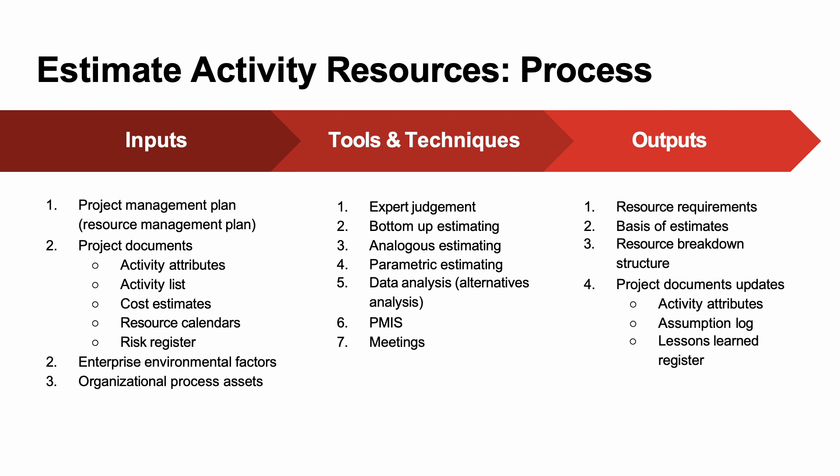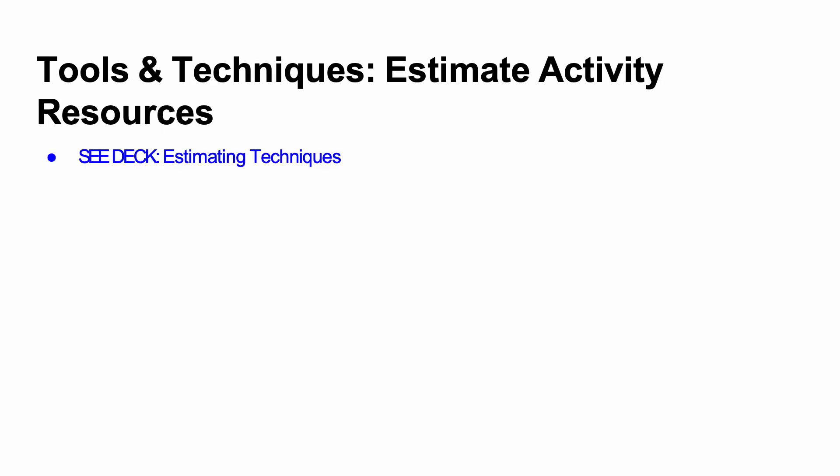Whenever we make estimates, we must document the considerations and assumptions that went into them. We may be asked in the future to justify or revise estimates for durations, costs, or resource numbers, and we need to remember what we assumed. From first-hand experience, if you don't document this, you will forget — and it becomes very difficult to recreate or update. Review the estimating techniques deck we covered previously for further reference.